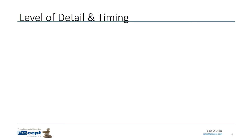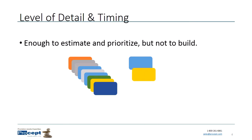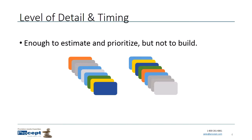First we'll talk about details and timing. The level of detail is quite specific: it's enough to estimate and prioritize, but not enough to build. We want to record enough detail that we can prioritize. Usually if we're doing software development, these backlog items are going to represent some features or some functionality, and it may be easy for us to prioritize them.